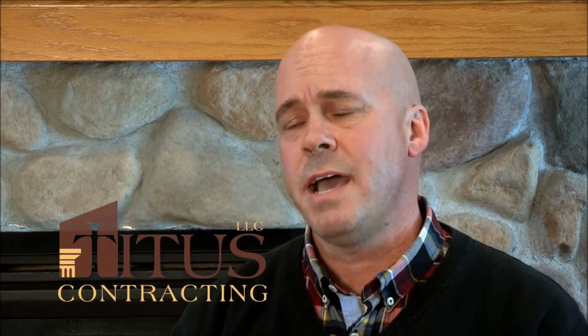We start by reviewing the plans with them, asking the question, what is important? What has to be part of this project? What's a must-have? Then we ask the question, okay, we've got past that. What's something you want to have, but if necessary, we can remove from the project? And we even like to try to prioritize that, to define what's the most important want and work our way